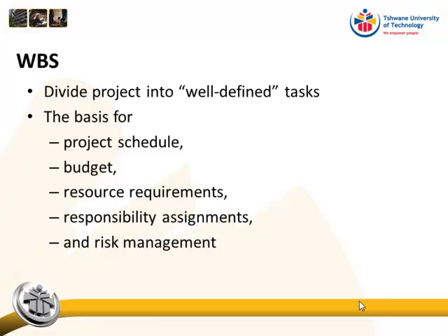When I say get it right, there isn't one way of doing it right. A correct work breakdown structure must contain all the work. That's when it's right, when it contains all the work. If I draw up a work breakdown structure and Zuzo draws up a work breakdown structure, they might not look exactly the same. That doesn't mean that I'm right and he's wrong, or he's right and I'm wrong, as long as both of our work breakdown structures contain all the work that needs to be done.